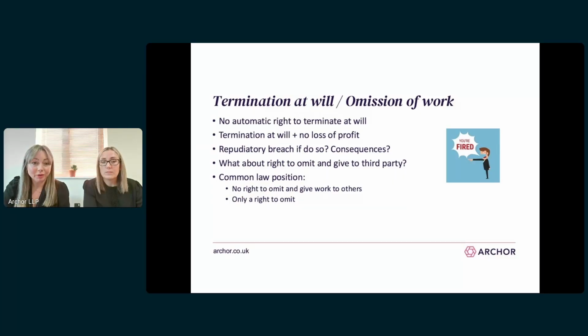So if you're an employer, you need to make sure this right is in your contract before taking any action to terminate, even if there's been no breach on the contractor's part. Now, if there is no express right to terminate at will, you should also look at whether the employer has a right to omit all of the works and give the works to a third party, as this really has the same effect as terminating at will.